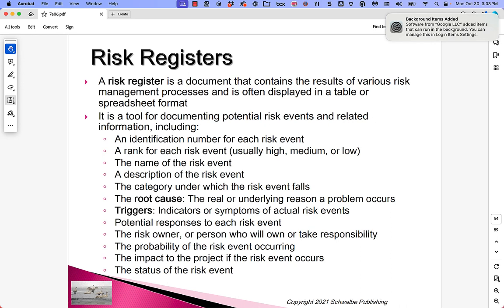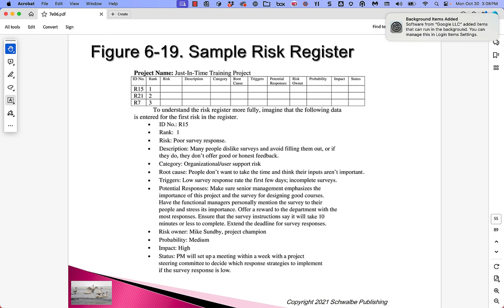We're going to talk about risk registers. Let's take a peek ahead at a document here — a risk register, partially filled in for the sample project from the book. It's just a spreadsheet. We've got an ID number, a rank, the risk, the description, the category, the root cause, the triggers, potential responses, the risk owner, the probability, the impact, and the status.